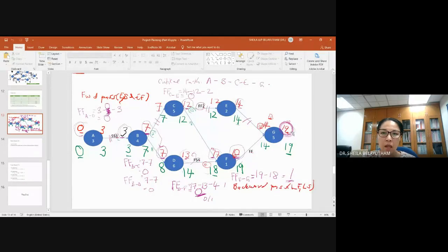You might find total float and free float numbers especially at the junction. Why? Because we chose the bigger number here, so the smaller number would have the additional time to complete. And free float, so free float is about the next activity. It does not concern directly the total project duration, but it concerns the next activity.